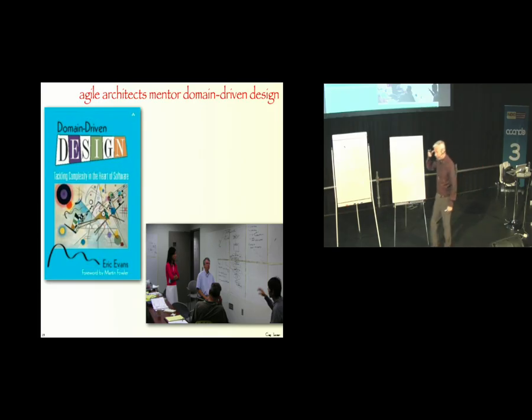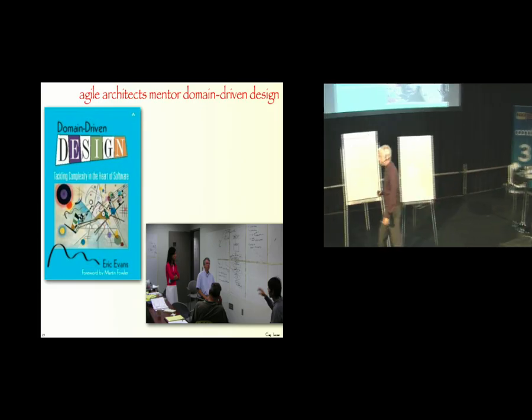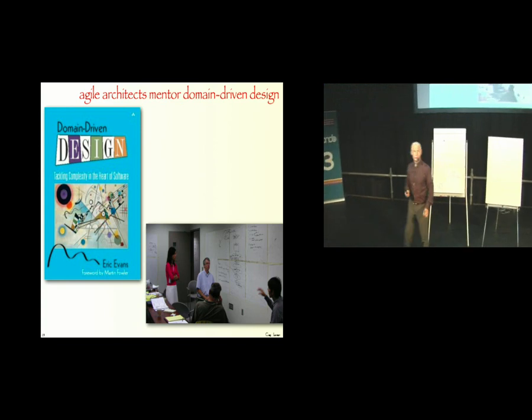In Scrum, there's nobody outside of the team. There's no architecture group. There's no architect who is not a hands-on worker in a team. So if, for example, this person was involved in architectural work or some kind of architectural leader, they would also be a hands-on team member in a Scrum team building real features.